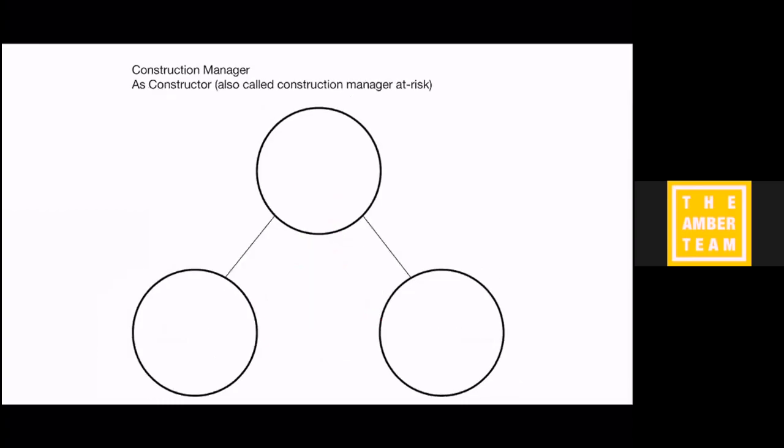All right. Now then, the construction manager took on even more risk. In fact, this flavor is called construction manager at risk. So this is construction manager as constructor. Go ahead and take a second to mentally fill in the parties and their contractual relationship. So now basically the construction manager has pushed over the contractor, and the owner is now hiring the architect, but also hiring the construction manager early. You see, that's a much quicker way to do things.